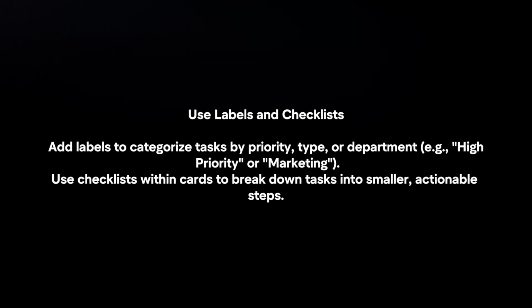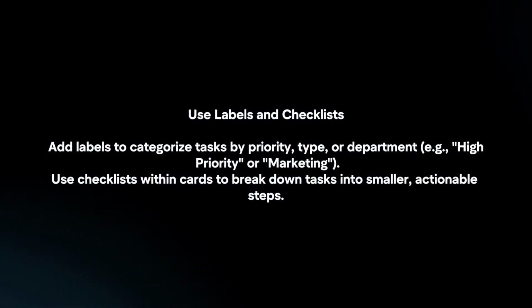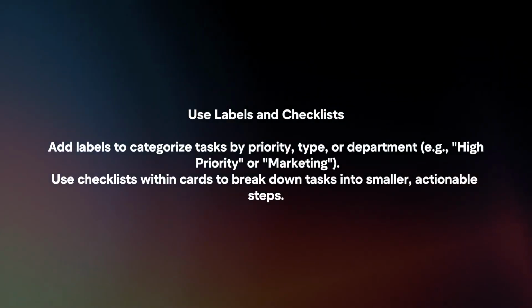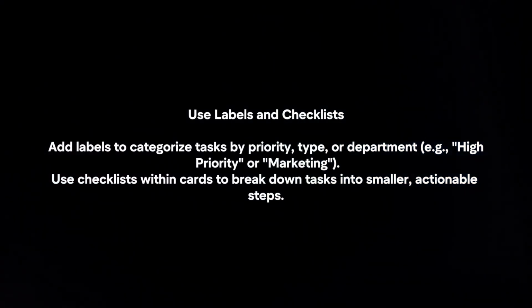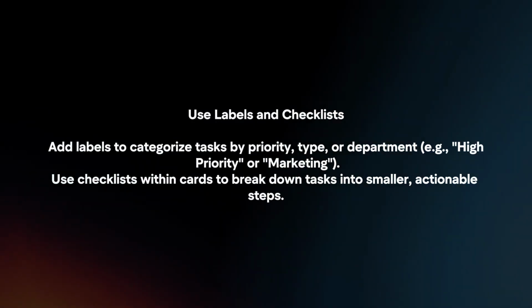Use labels and checklists. Add labels to categorize tasks by priority, type, or department. Use checklists within cards to break down tasks into smaller, actionable steps.